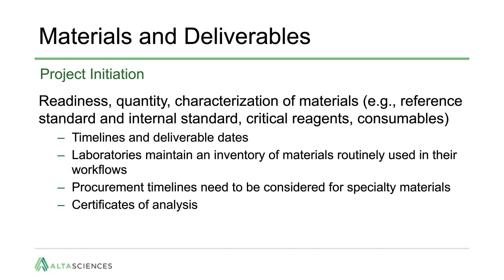While laboratories maintain an inventory of materials routinely used in their workflow, procurement timelines need to be considered and managed for specialty materials. The review of the documentation, such as certificates of analysis, should occur as the materials become available. This provides time to discuss and address any questions and evaluate based on the project or projects for which the material will be used. As a very simple example, if the CLV is not suitably clear to determine potency calculations for stock solution preparation, discussion and agreement may be required.